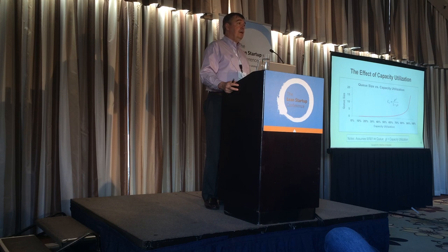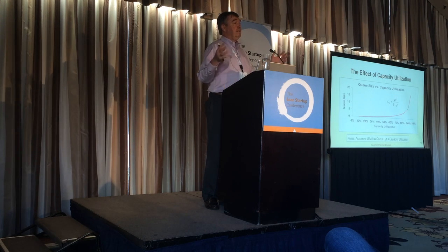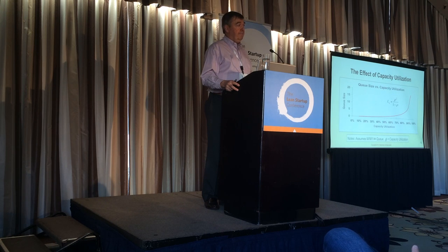In practice, we load it to a higher level of utilization, and then we scratch our heads and say, I wonder why things don't come out on time. Maybe I need to leave more margin in the schedule. I need to build bigger buffers in what I'm doing and things like that. Well, what you need to do is to learn that you can't load a stochastic system to 100% utilization without dramatically affecting the cycle times in the process.